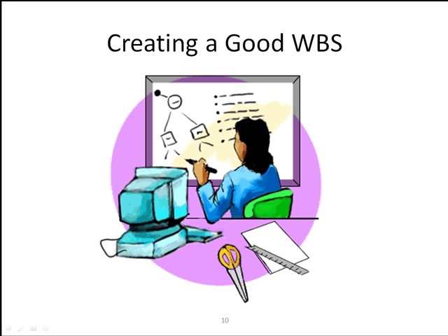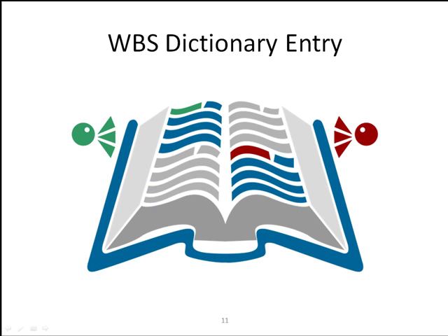Sometimes people confuse tasks on a work breakdown structure with specifications or think it must reflect a sequential list of steps. That's not it at all. You're actually defining areas of work in a hierarchical tree. If you wanted to get the very specifics of each one of the tasks, you would use what's called a work breakdown structure dictionary with different entries. This is simply a document that describes each work breakdown structure task in detail.